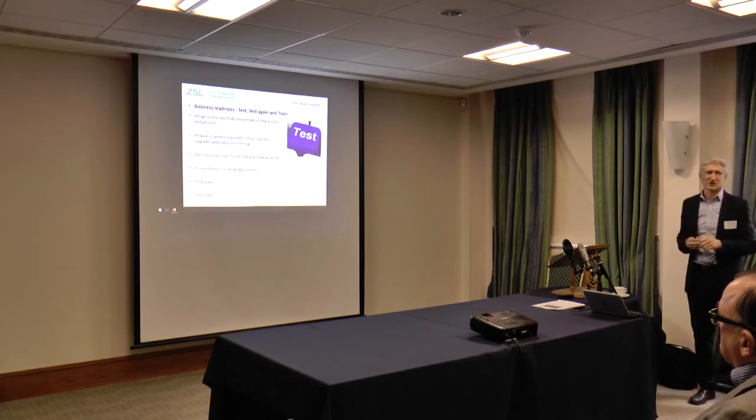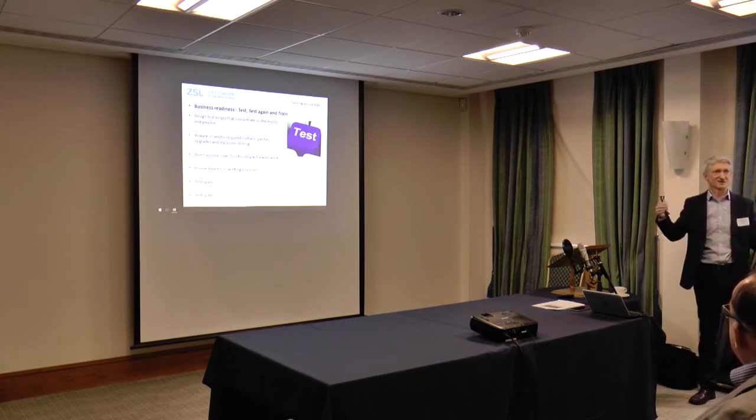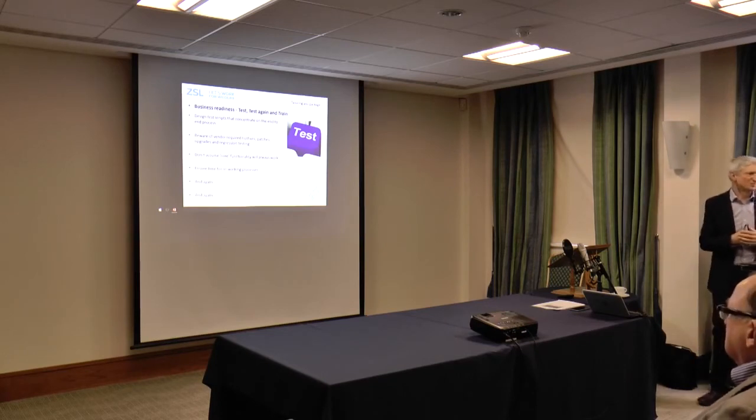As I say, moving parts, there's lots of stuff going on. We did have some problems where you've got a fix and a bug fix and a new release and a version coming, and you've got to test it before you can put it on. So again, that's all part of your project management, but vendors will work with you on that, but you need to manage those as well, because it can be quite disruptive and can affect some of the timelines.